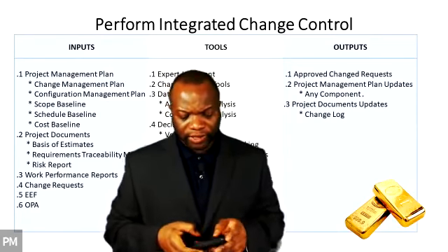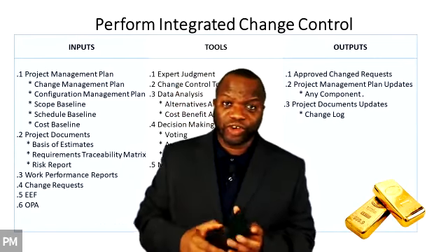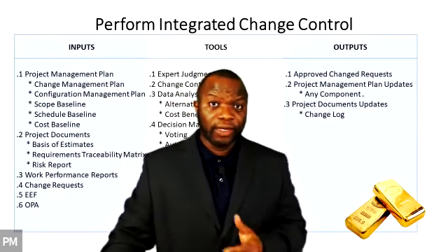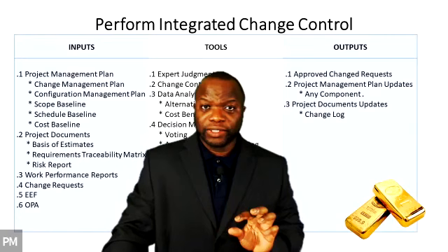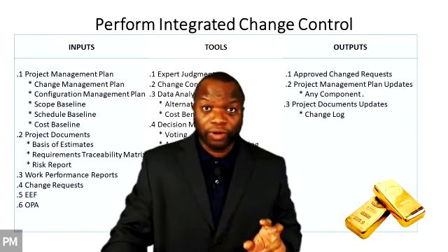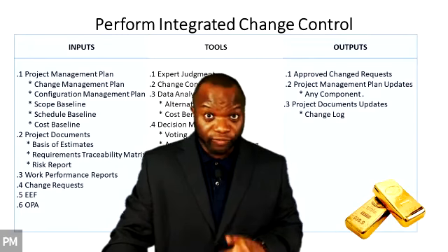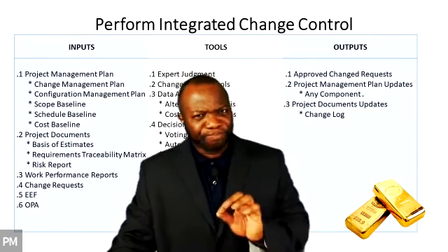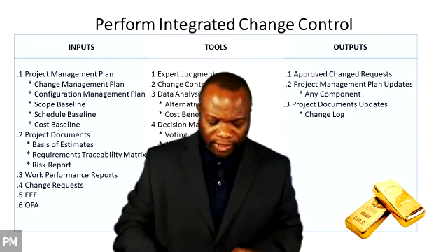All right, if it's there and it says this should be configurable, you got to be tracking it using a configuration management approach. Any item that is mentioned as a configurable item needs to be controlled, needs to be version controlled, and the specs need to be versioned. Okay, it's as simple as that.